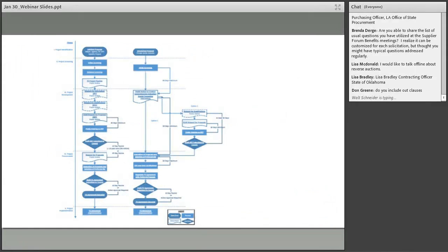In that instance, you can see on the right, there are two options. We can go straight to request for alternative proposals, or we can go the RFQ qualifying route, which will allow us, again, to down select from a larger pool of those who think they have a better alternative to a smaller pool. And of course, throughout that, the original unsolicited offer will also be in that pool and get a chance to update its proposal based on the refined or defined requirement.